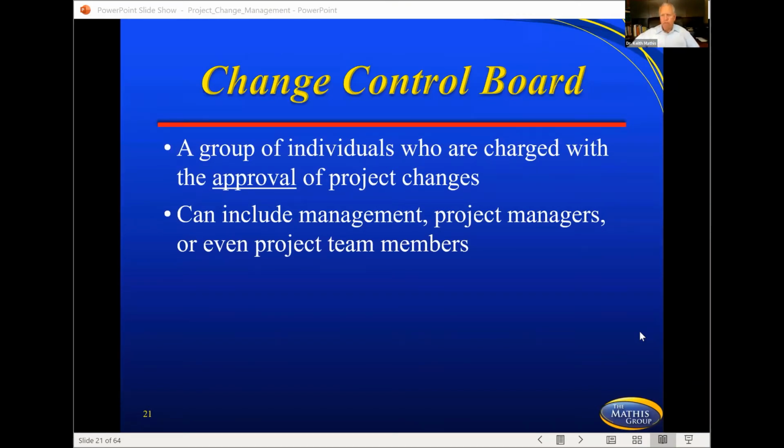Not every one of your projects is going to have a change control board as formal as what we're talking about. It's a group of people who are charged with the approval of project changes. They can include several different things: management, project managers, team members, the customer, different stakeholders. But the point is, these are people who have authority to say yes or no to more money and more time, because you don't want to make a lot of changes that just fit into the time period.